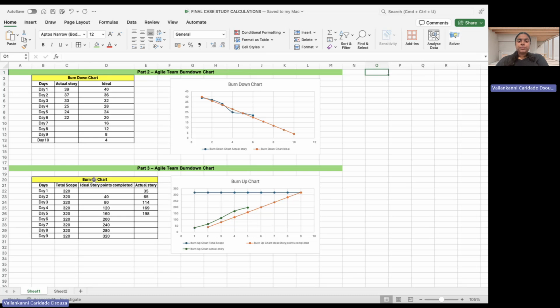These fluctuations can be explained by several factors: uneven task complexity, shifting priorities, or the team addressing more bug fixes in sprint 5. At the current rate, the team needs approximately 3 more sprints to finish the remaining 122 points. This is achievable but will require consistency.